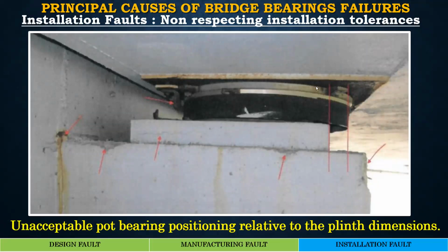So I think these are very, very important issues which should be addressed during the installation process. In case this kind of positioning problem arises, the matter must be referred to the design engineer.